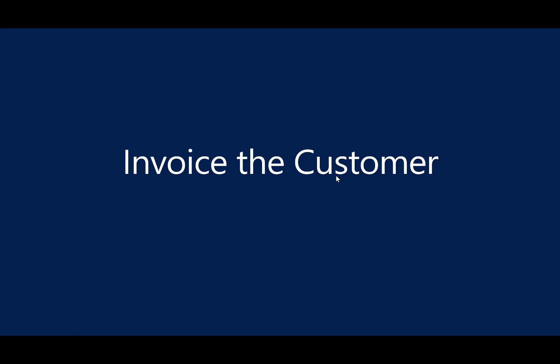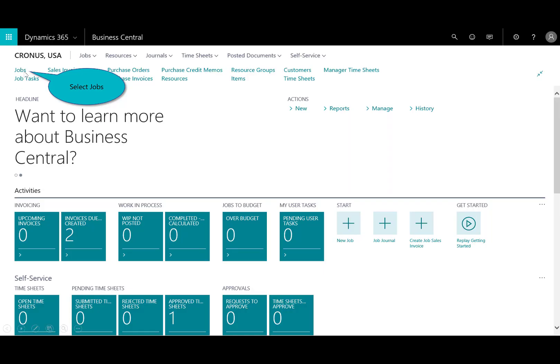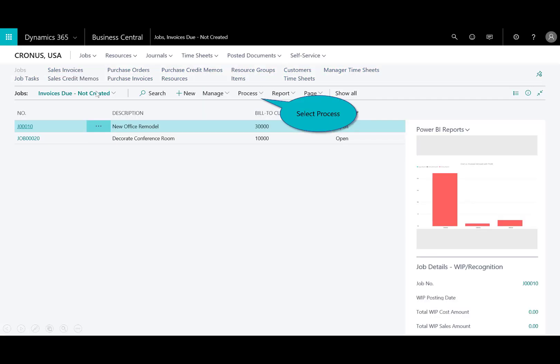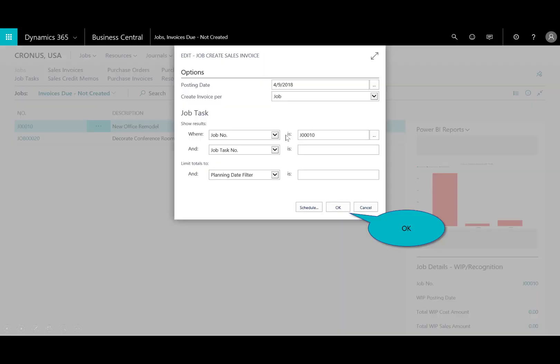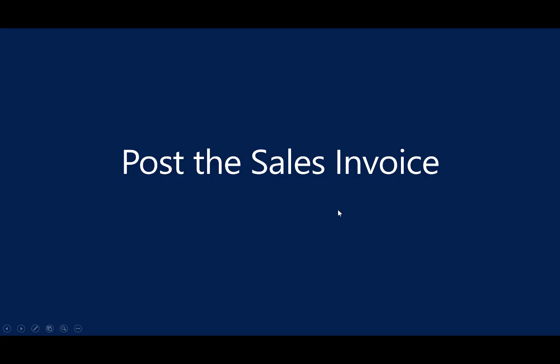And then I'll need to invoice the customer. So, I can create an invoice for a job for one or more job tasks, depending on where I am with the invoicing process and based on the date of the invoicing and the invoicing schedule. I can also create an invoice from a job planning line and indicate that all the time and the quantity of the time, resources, and the general ledger accounts that I want to invoice. I'll select jobs. And, again, here's that new office remodel. And I'll select process. And I want to go and create the invoice. So, you can create an invoice for a job, again, for one or more tasks. Click on OK. And, again, this is filtered to just this particular job. And then I'm done.